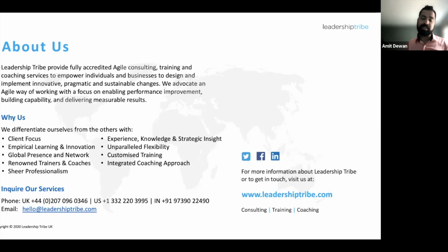There are different ways, but the bottom line is, have those conversations in your retrospectives: last time we got stuck because we did not think of a dependency earlier. How can we groom, refine better, so we don't come across that situation? So again, a continuous learning cycle, and the ability to appreciate that surprises will come. Let's not make a habit out of it, and use the retrospective to root cause, five whys, to learn how we get better at it, and go from there.